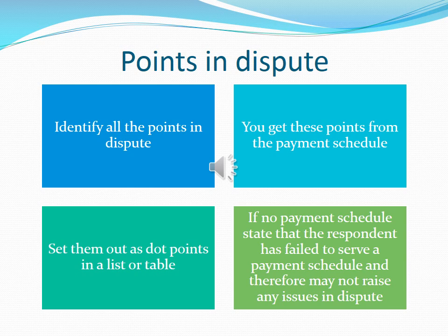Remember to respond to each point. Address each point for non-payment in turn. Remember, there are only 3 legitimate reasons for non-payment. State why the point is incorrect. This will normally be a way of asserting a fact. Support this fact by referencing evidence. If no independent evidence, the adjudicator will often look at the behaviour of the parties.